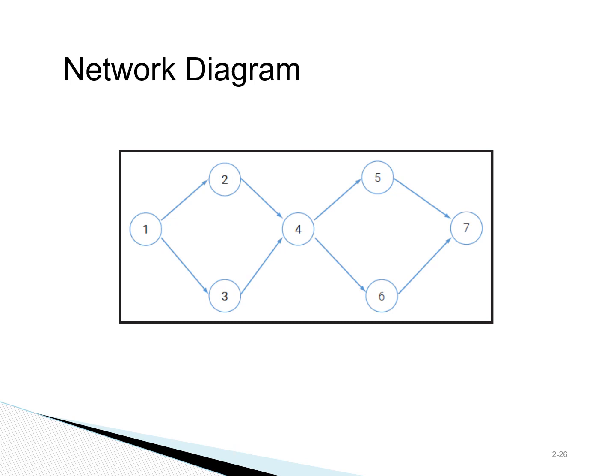After you put in the information about the tasks, one of the things that can be done is to demonstrate how the tasks are related. For example, in this diagram, it's clear that tasks 2 and 3 can happen only after task 1, and task 4 needs to happen after tasks 2 and 3 are completed.